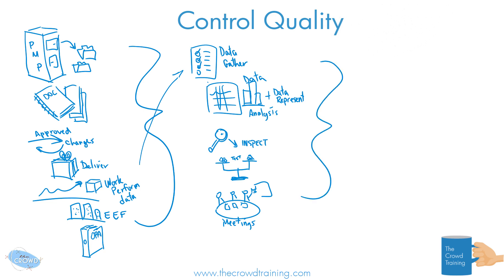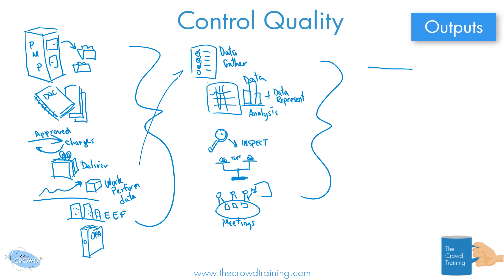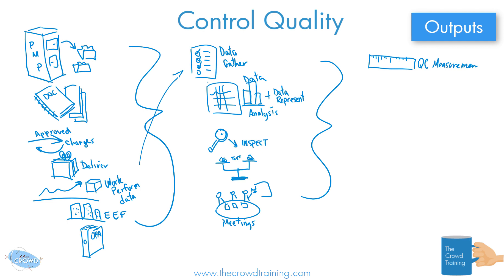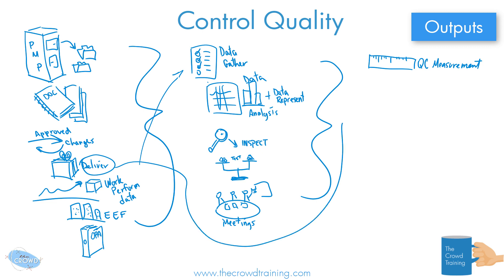So what do we get out of controlling our quality? Those are the outputs. One, we should have these measurements — as we're collecting them, we should have something to show. So I'll draw a quick ruler here to represent the quality control measurements that we have gathered, collected, and done. Also, the work that we have delivered — not only did we deliver it, but it is A+. We have verified it, and this deliverable does in fact meet all that we said it would meet. So it's a verified deliverable.